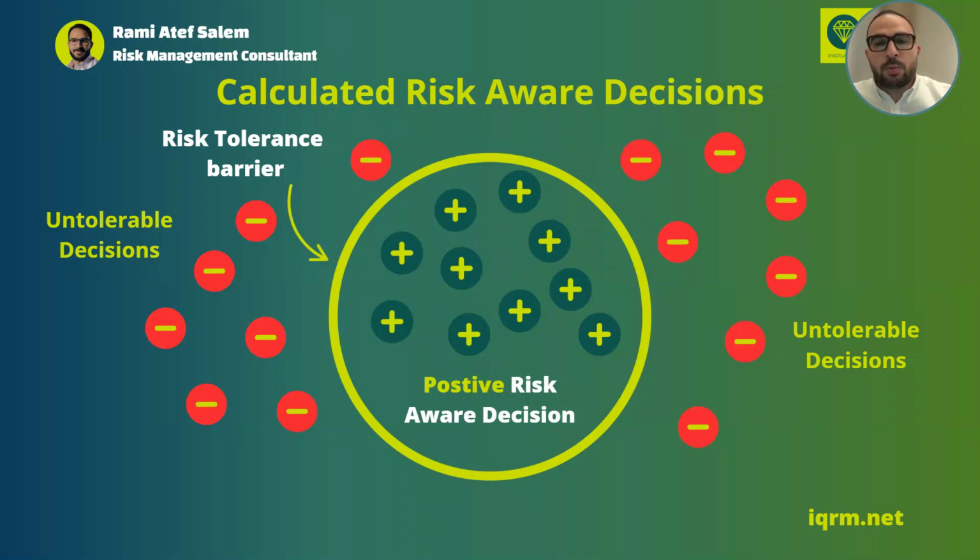So what we do, we build up our RDE first to understand what is the data behind every decision, and then we build our models, and then we assess the decision using our utility curves that tell us, okay, this is within our risk tolerance barrier, this is outside our risk tolerance barrier. So the best decision we select is based on how much risk we can take.